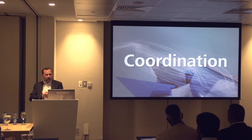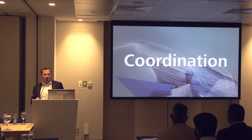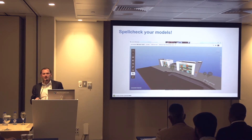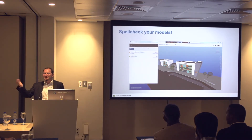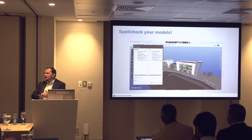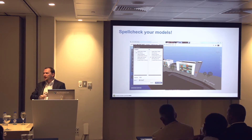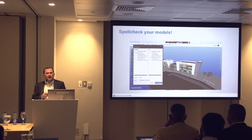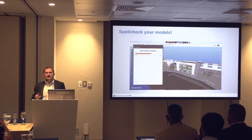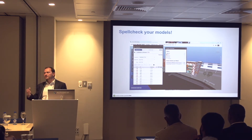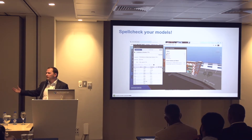From a coordination point of view, who uses Navisworks in the room? And how many times are you managing hundreds and hundreds of clashes? Who's aware of BIM 360 Glue? BIM 360 Glue is based on the same viewing engine, the same clash engine, and the same file readers. It does the clash detection. The reason to use both is to allow particularly the design teams to do clashes like a spell check on the model before they pass it on — identifying their own clashes before it gets to the BIM manager at the end of the week.